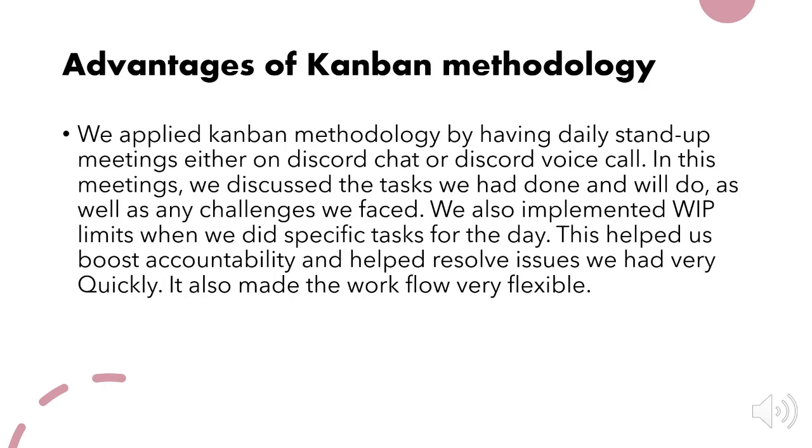Advantages of Kanban methodology. We applied Kanban methodology by having daily stand-up meets, either on Discord chat or Discord voice call. In these meets, we discussed the tasks we had to do, the tasks we had done, and the tasks we will do, as well as any challenges we faced. We also implemented WIP limits when we did specific tasks for the day. This helped us boost accountability and resolve issues we had quickly. It also made the workflow very flexible.